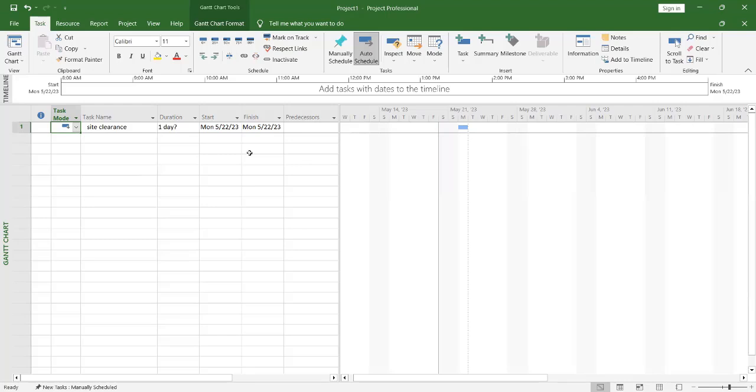But all those things can be adjusted. You can adjust your calendar, you can set your own calendar to meet with what you want. If you want to work even Saturday, Sunday, there are some companies that work Saturday, Sunday. So you can set your calendar to work any days that you want to work. But based on the default of this, we don't work on Saturday, Sunday.